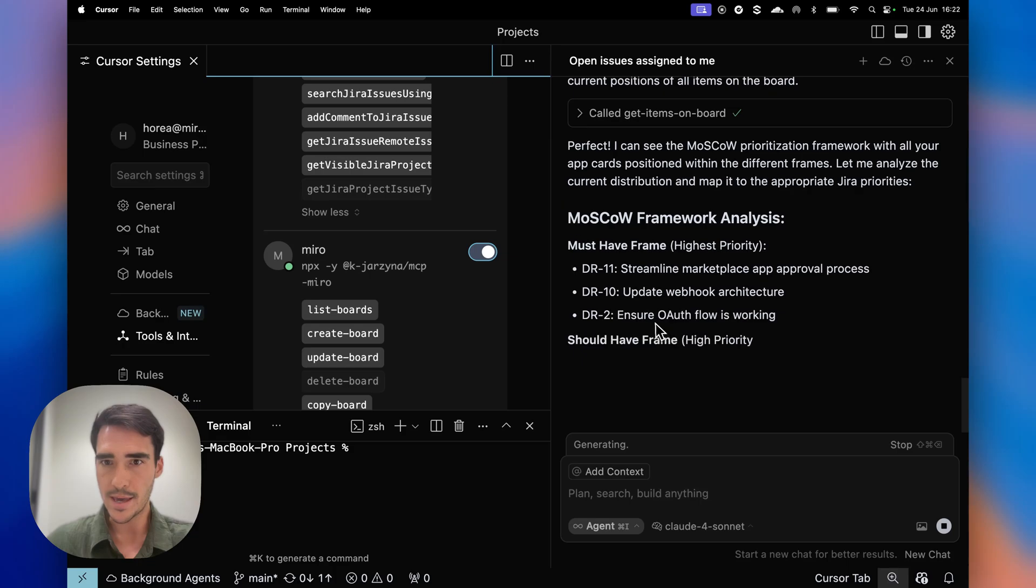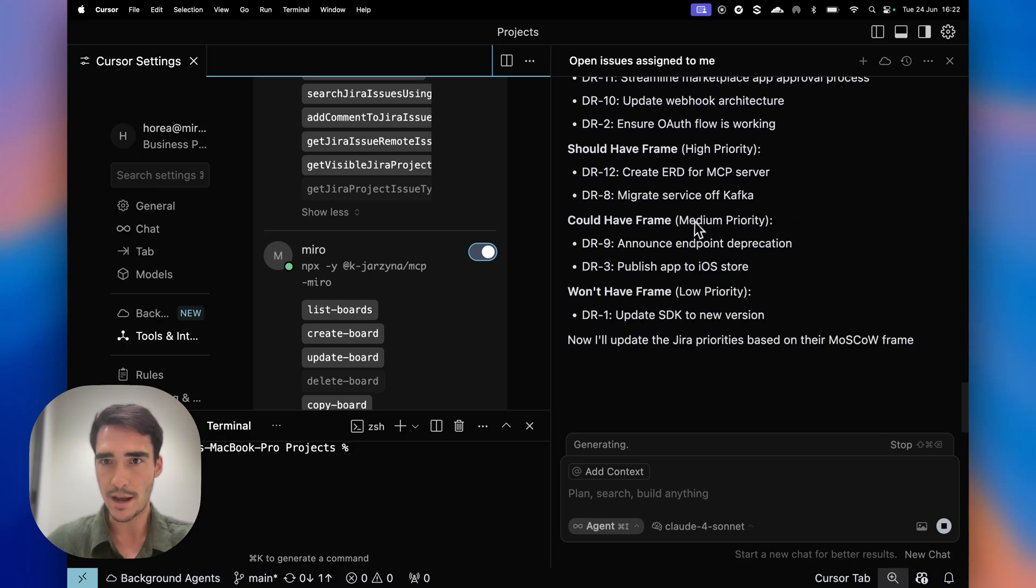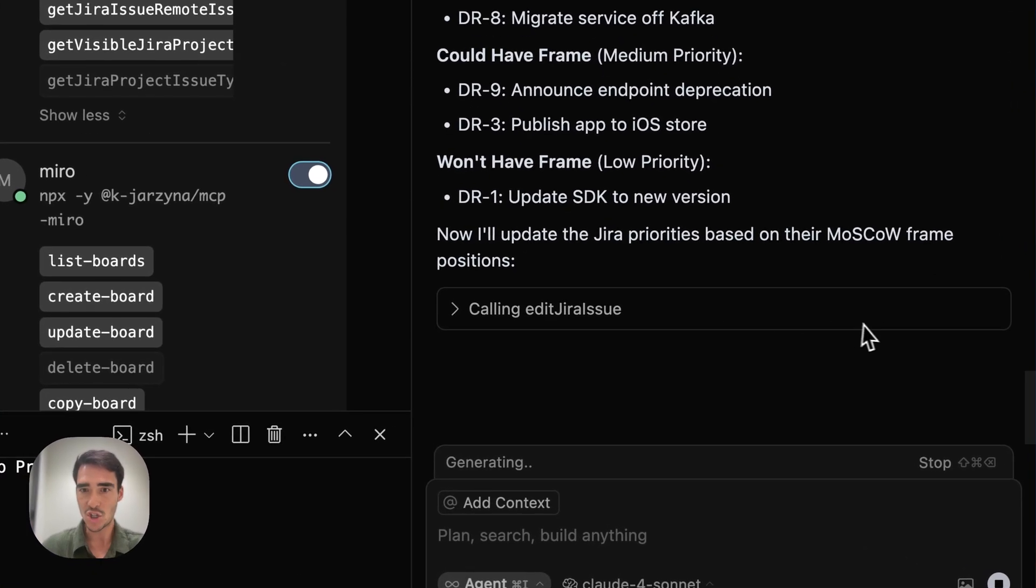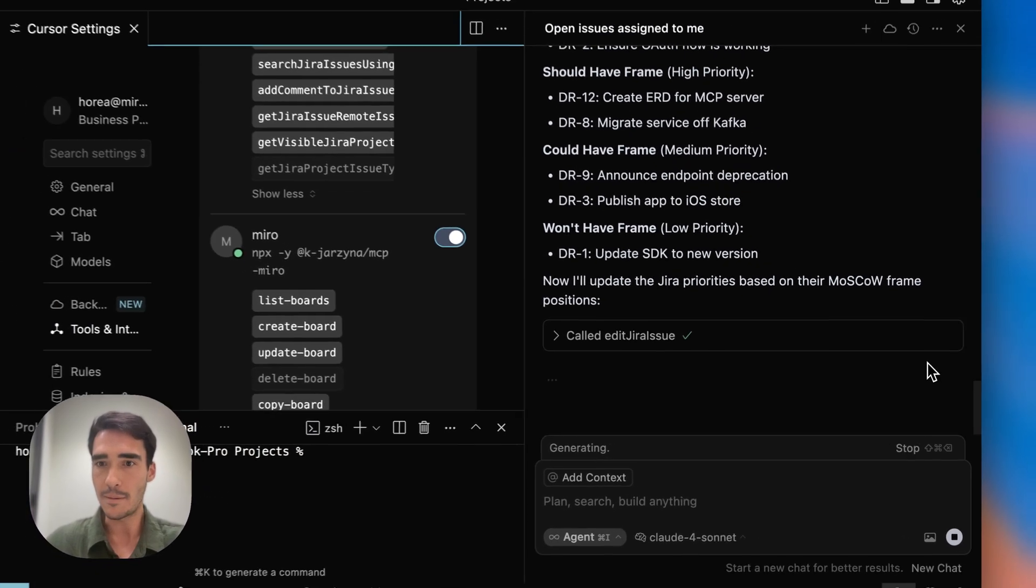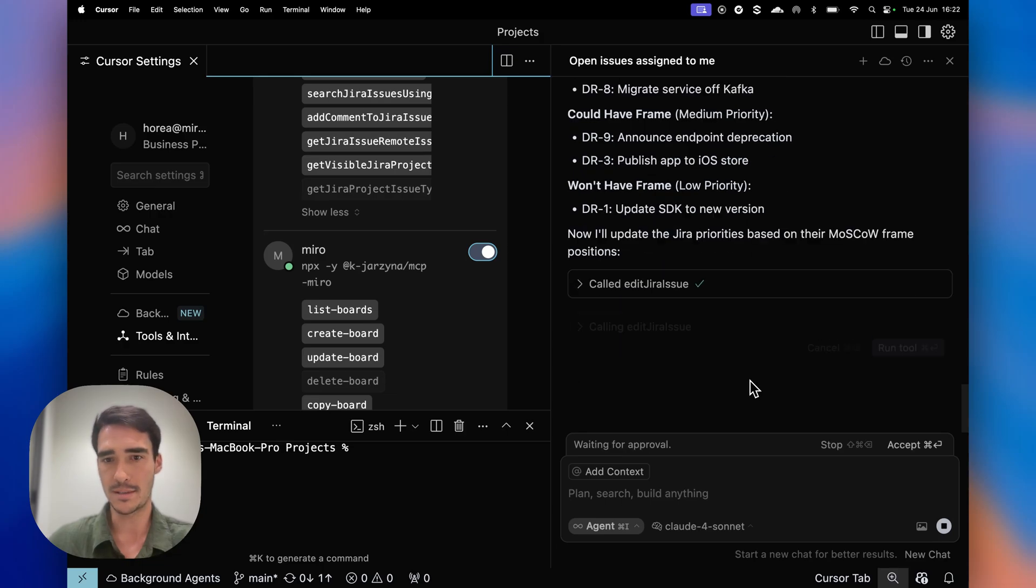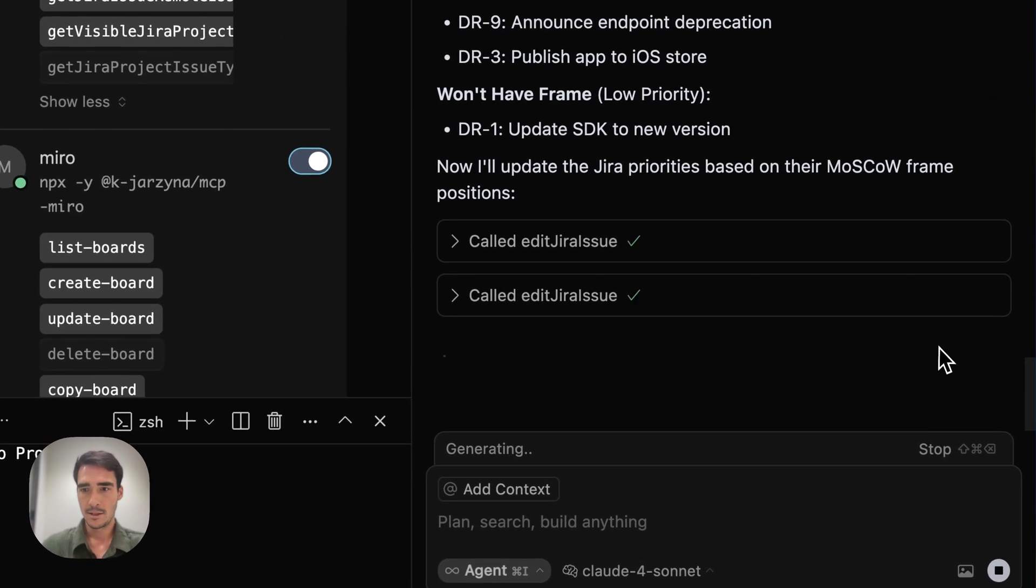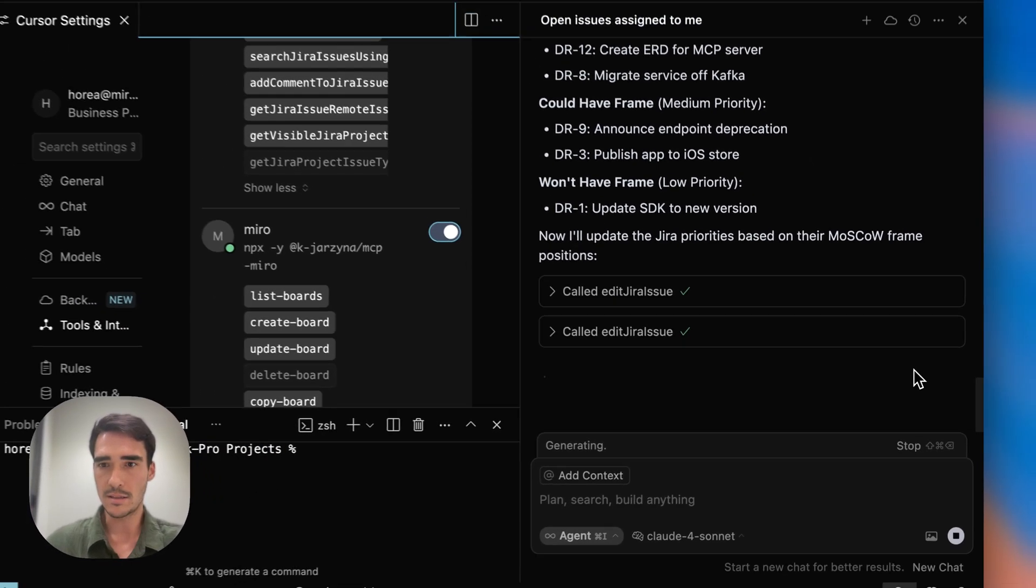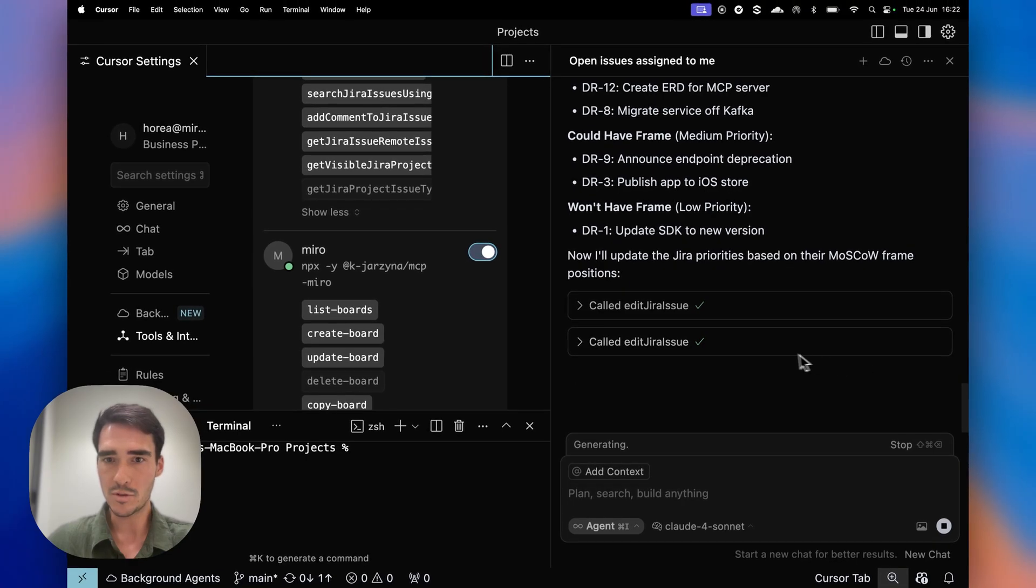So, yeah, must-have is the highest priority, should-have is high priority, could-have medium, won't-have low priority. So now it's going to have to edit the Jira issues and update these versions for me, but it's going to have to do it eight times, which is a bit tedious here. But I'll show you how it's doing it step-by-step.